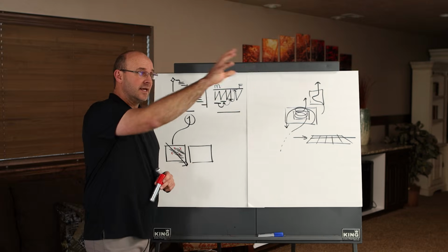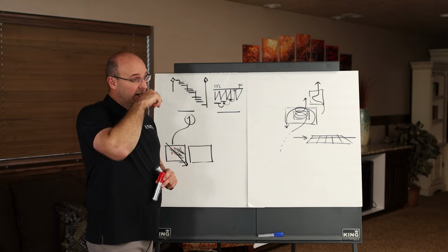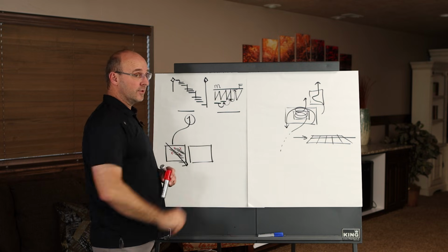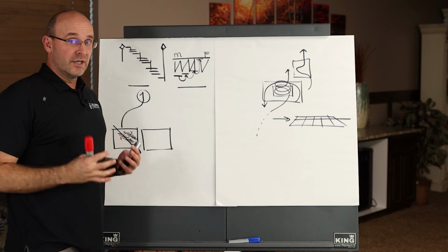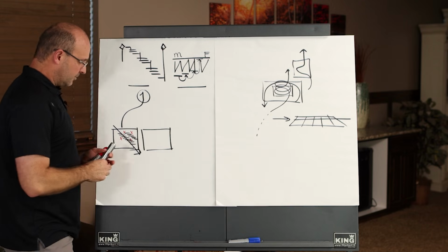You're looking for, is that mechanical equipment on track? Are those permissions on track? Is that RFI going to be answered in time? Is that shipment from overseas going to make it on time? You're looking for roadblocks there so that you can plan ahead.